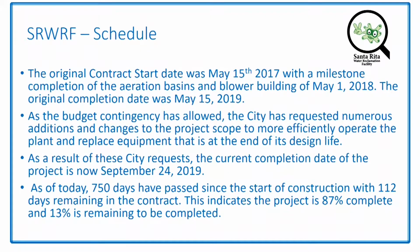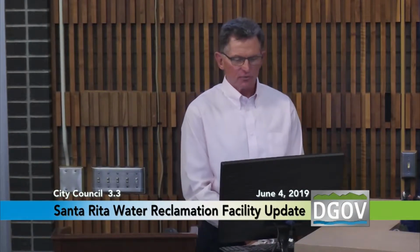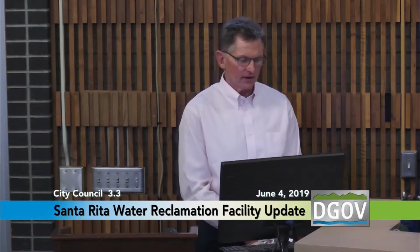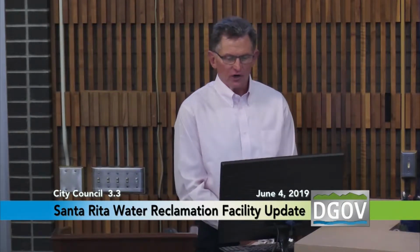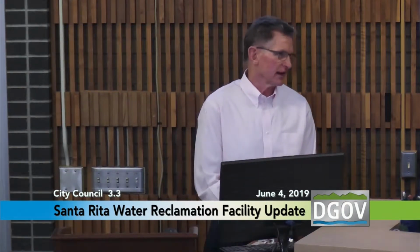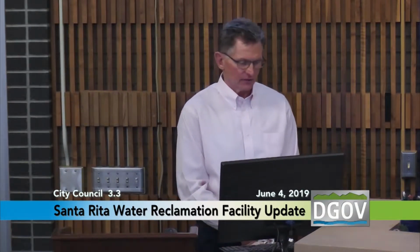As the budget contingency allowed, the city has requested numerous additions and changes to the project scope for more efficiency in the operation and to replace equipment that is at the end of its useful life. As a result of these city requests, the current completion date of the project is now September 24th. As we've added construction projects or sub-projects, the contractor has asked for more time to do that, which we thought was reasonable. So that extended the completion date out a few months.